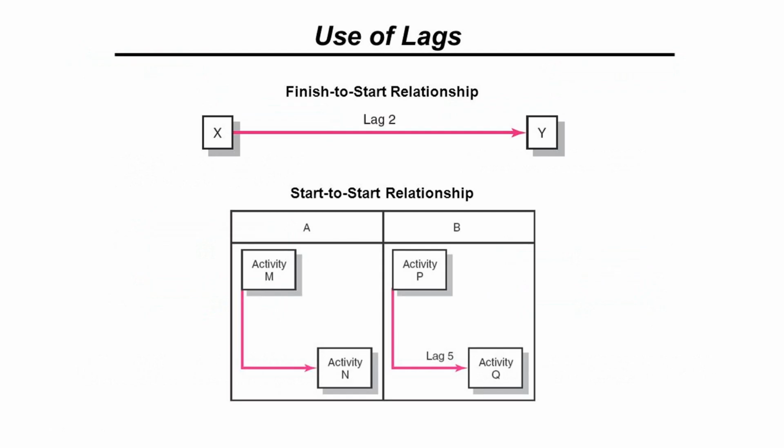Another very important term used in project management and here in Microsoft Project is lags. A lag looks like we give a delay. So if we have a relationship like start to finish between task A and task B, before task B starts, we give a delay, a lag, before starting this task. Okay, it's very important to use these features here in Microsoft Project.